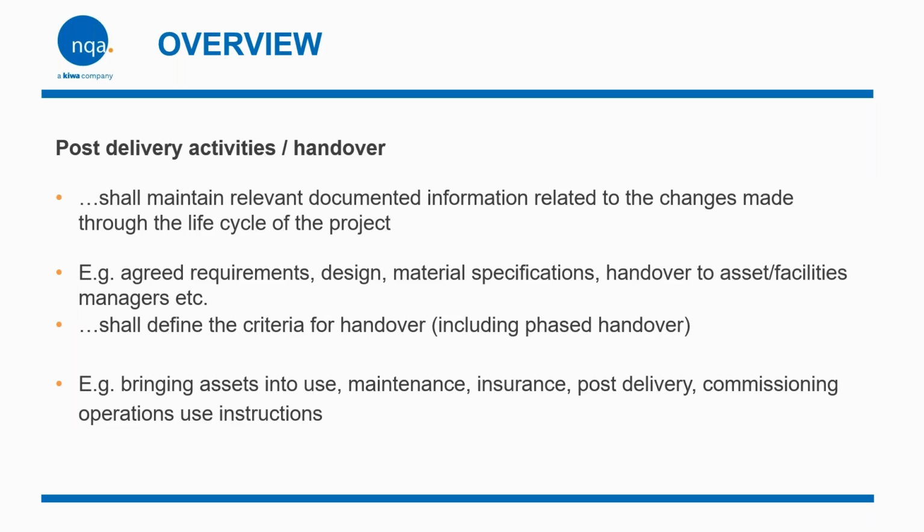Post-delivery activities and handover. You shall maintain relevant document information relating to changes made throughout the life cycle of the project. This is sort of getting within the construction industry, looking at O&M manuals. You're going to agree requirements, design, material specification, handover of assets, and facilities managers, and you're going to define the criteria of a handover, including phased handovers.